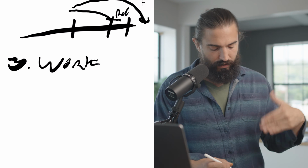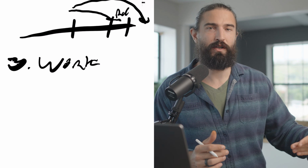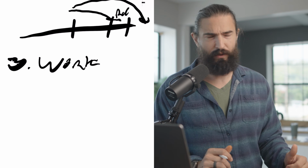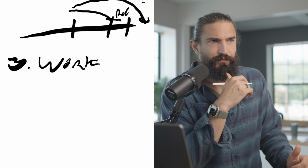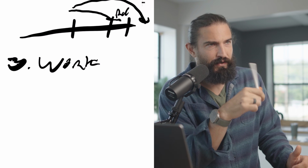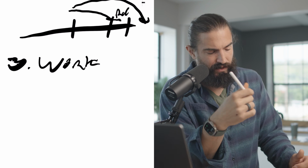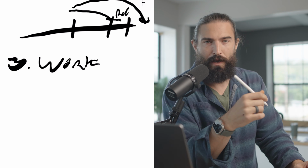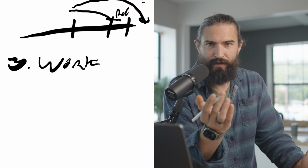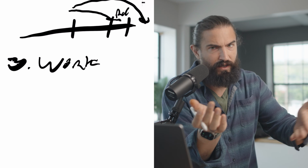Okay, so first thing is, you can push back on it. And the way that I always push back on things is just by breaking it down that way. So we got, this bid looks a little bit high. And I'm thinking that this here would take, like, two guys a day? So we're talking a couple man days. And you probably pay the guys $200 a day or something like that. And so what is that? $400 for this thing in labor.